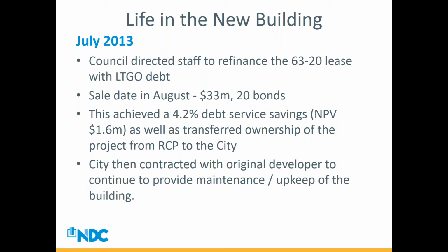Ownership of the project was transferred by NDC from the Redmond Community Properties back to the City of Redmond. We resumed ownership of the property and the building and all the amenities that were created through this project, and now we're full owners. The Redmond Community Properties no longer needs to exist, and NDC was very, very helpful and cooperative in getting us into the new environment. As I said before, and hinted I would come back to it, we then had opportunities to go back and contract with whomever we wanted to do maintenance and upkeep and some of the improvements in the building that I've talked about.